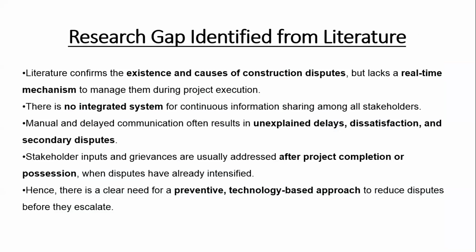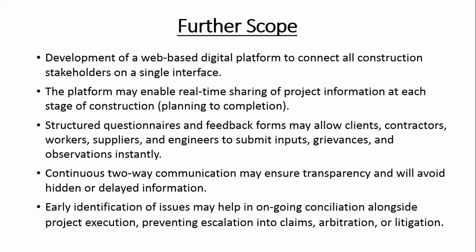Manual and delayed communication often results in unexplained dissatisfaction and secondary disputes. Stakeholder inputs and grievances are usually addressed after project completion or possession, when disputes have already intensified. Hence, there is a clear need for a preventive, technology-based approach to find a resolution before disputes escalate.